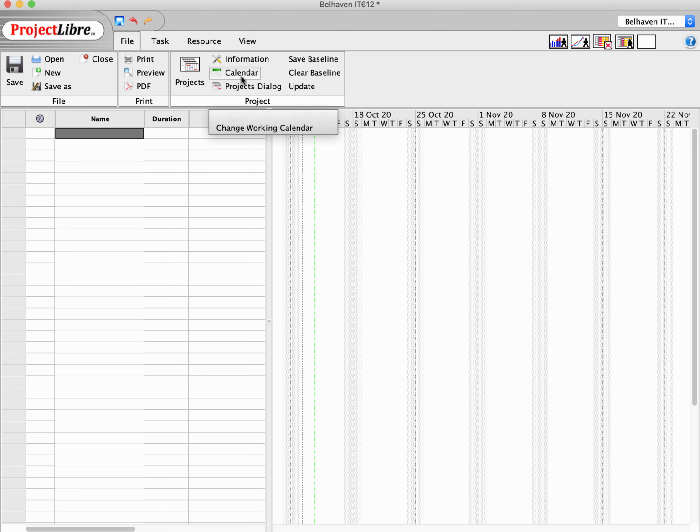Calendar, on the other hand, has to do with the default workday versus specialized workdays. So the default in project tools generally is Monday through Friday, 8 a.m. to 5 p.m. Often that will have a built-in lunch hour for an hour, so an 8-hour day. In addition, you may have overtime, and the basic calendar can handle overtime.